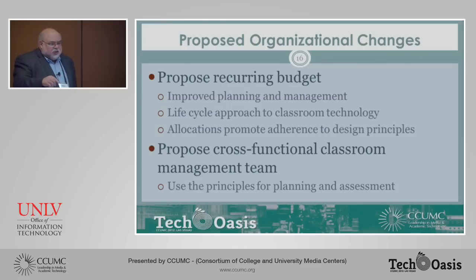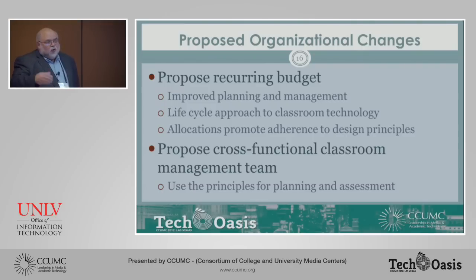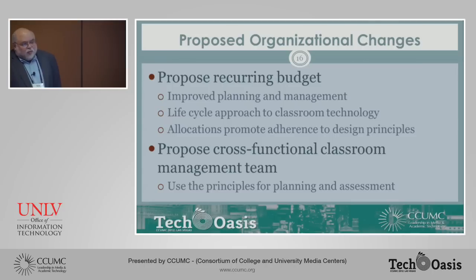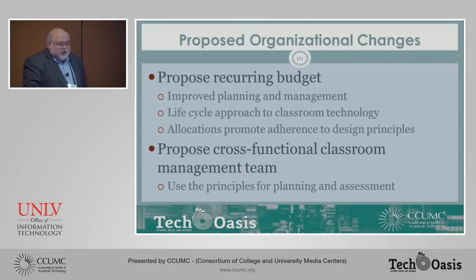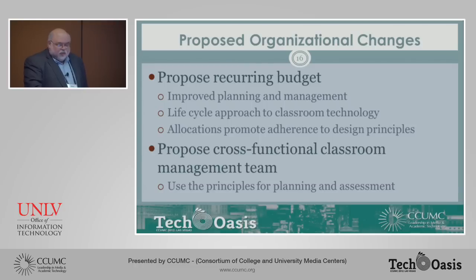To deal with those issues and keep things on track, we also proposed the creation of a recurring budget. Classroom design, as it is at most places, is ad hoc — you get some money and address some rooms, or a new building is built. Instead, we believe we need to apply the same life cycle approach used for computer and network technology to all components of the classroom, managed by a cross-functional classroom management team. We've done this at the University of Pittsburgh for about 20 years with really good effect.